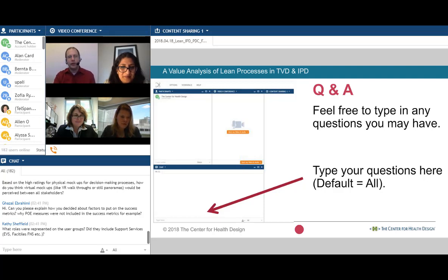The first question we got was: $44 million under budget. Wow. What was the original budget, and where did the cost estimate come from? So originally, when the project started, we did a validation study, and typically on integrated projects, that's where you start. Based on our understanding of the scope and the quality the team could put forward, we put together all the information and came up with an estimate.